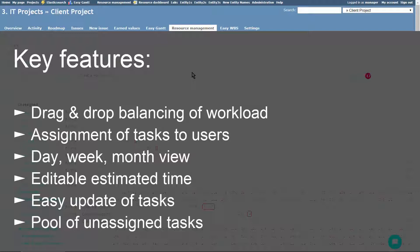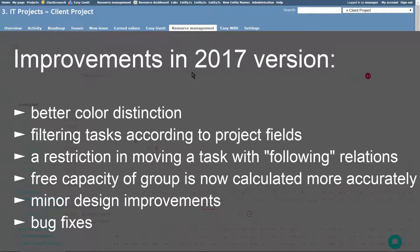Since 2017 version, there have been some improvements in the plugin, such as better color distinction, filtering tasks according to fields of their project, a restriction in moving a task with following relations was added, and the free capacity of group is now calculated from tasks assigned to the group as well as tasks assigned to the members of the group.